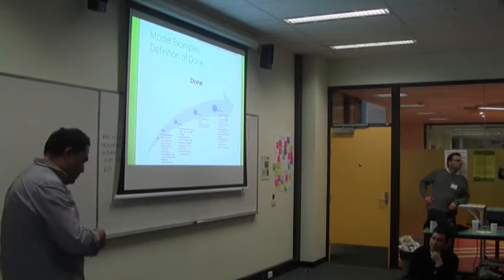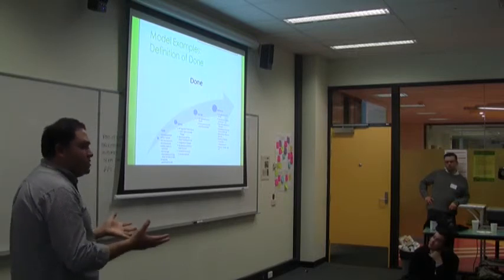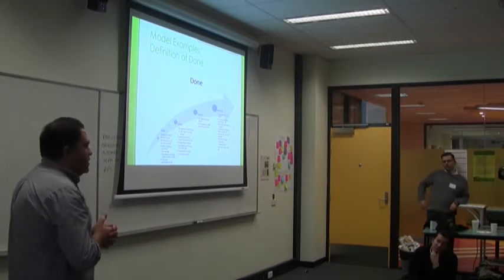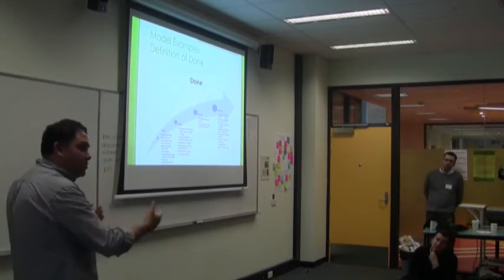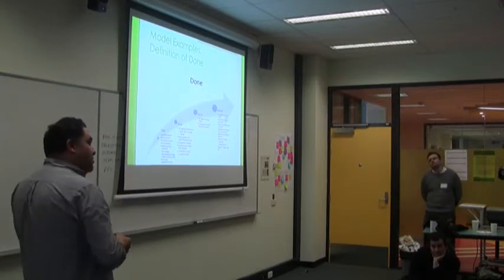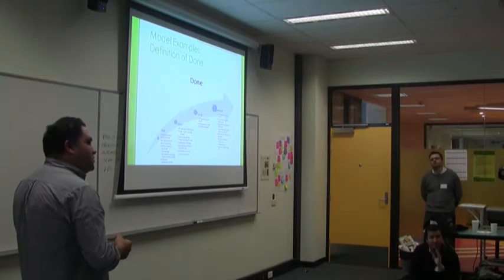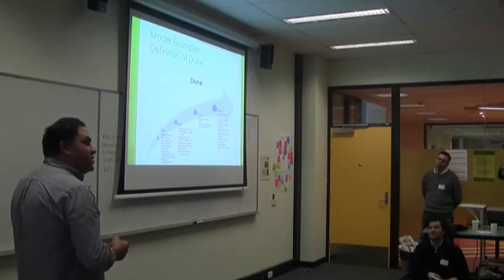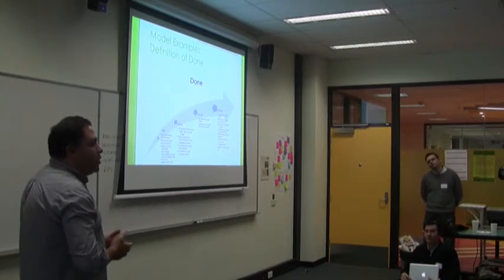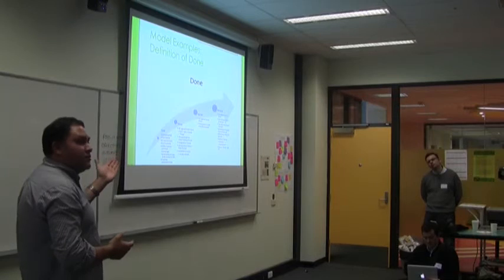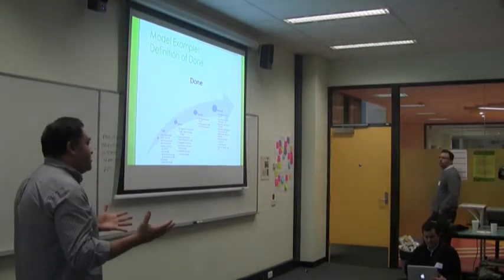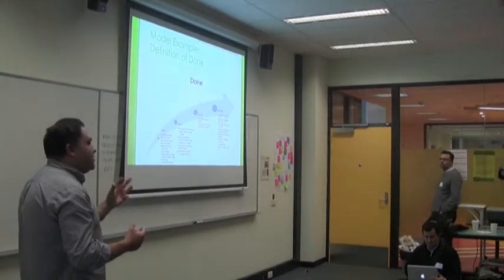Yeah, so what I did with my team, I sat down with the test lead, or whoever's going to manage the testing process, and I said, okay, when we have a defect, let's talk about what our process is. Do we move that back into the backlog for the product owner to make a decision on whether we deal with that defect or not? Or do we take a default position, like you've done, where defects suddenly become the most important thing for us to do? And usually technical guys love that approach. Defects, we've got to kill them, we've got to get them.